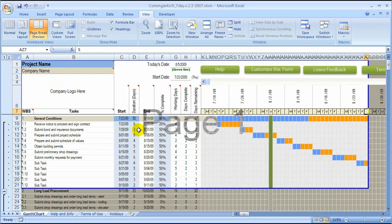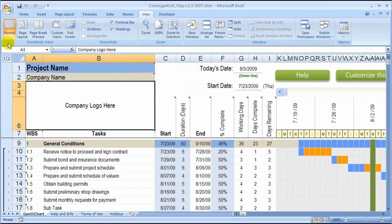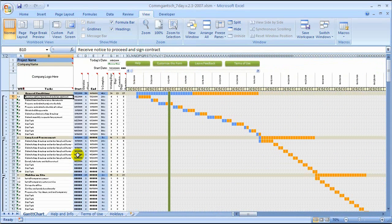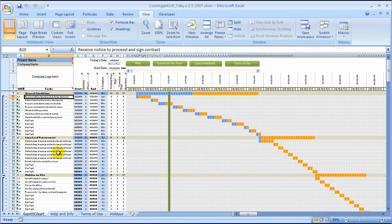We're all looking at blueprints, so we're all very familiar with the sizes of those blueprints and how to print them. What we do instead is print the sheets to a PDF file, or to a file that our reprographics company can translate in their printers. We set it to the same scale so we can create A, B, C, or even D size sheets of this schedule. We like to work that way best — we can put this up on the wall inside the job trailer or in our office, so that as our project management team evaluates crews, timing, and scheduling issues, we can refer to a full-size sheet.